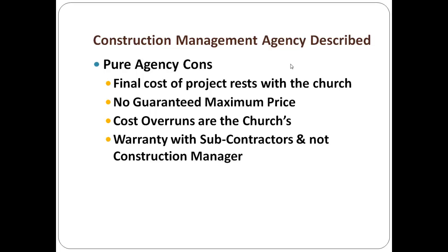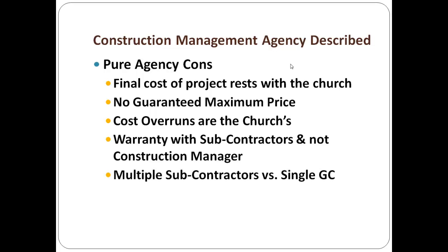Be aware that your construction manager needs to step up to the plate, negotiate the warranty, settle the conflicts, and help you through the process. But legally, as I understand it, the warranties are provided by the subcontractors who did the work and probably supplied the materials and equipment in your project, and they guarantee it. That can be perceived as a negative.